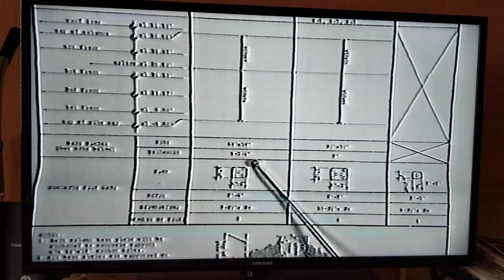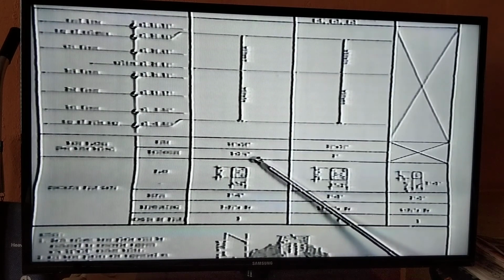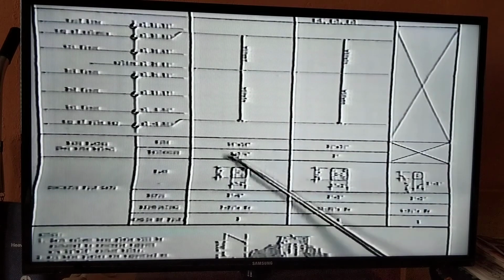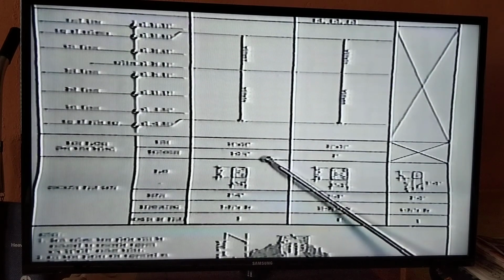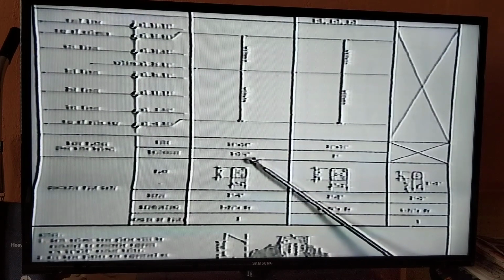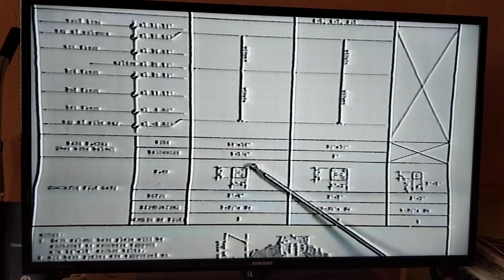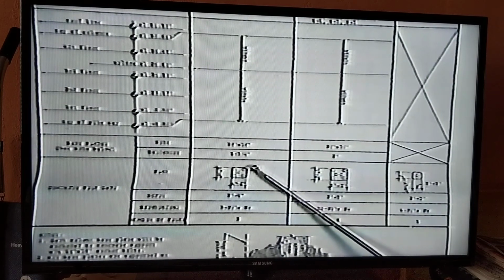And when we talked about steel in the vertical construction modules, we pointed out the section dealing with steel in Walker's. And we would find out that it's 489.6 pounds per cubic foot. So if we found out the volume of steel and multiplied it by 489.6, we would find the weight of one of these base plates. If we then multiplied it by the number of base plates that we had, we would find out the weight for all the base plates.